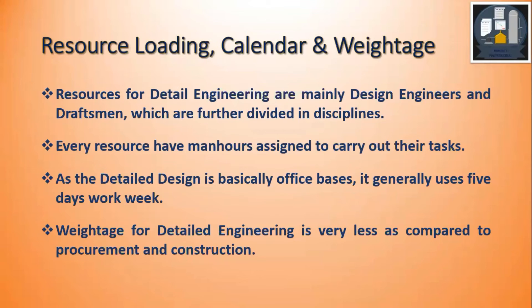Detailed engineering is man-hour based — each deliverable requires a certain number of man hours to be produced. Engineers or draftsmen are assigned certain deliverables, and based on those man hours, each department or design engineer has a total number of man hours to carry out their tasks. Each deliverable has the man hours required to complete it, and each design engineer and draftsman has a number of deliverables assigned to them, giving a total number of man hours for those engineers, discipline engineers, draftsmen, etc.